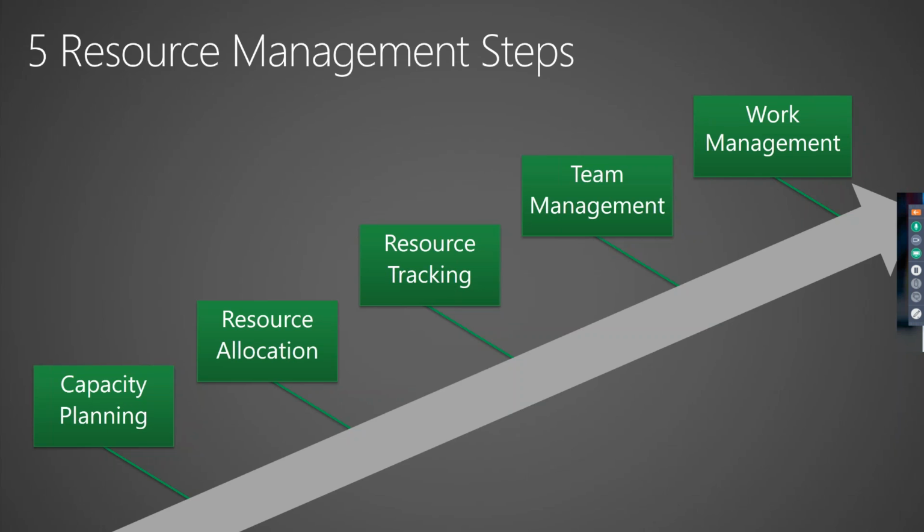During capacity planning, you'll see what generic roles you need to source your initiatives, as well as how much time or how many hours. Next stage is resource assignments. So in that stage, you can match skill sets and availability with actual named resources.